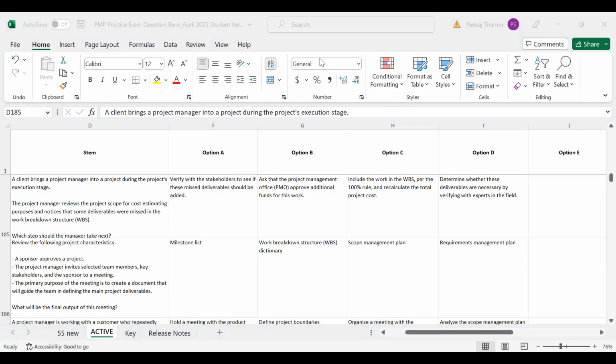Whatever is there in the work breakdown structure should be in the scope of the project. So the work breakdown structure should cover the 100% scope of the project. This is the 100% rule. Whatever is outside the WBS is outside the boundary of the scope of the project. Is that okay? Just text yes, I know you are not able to talk. Perfect.